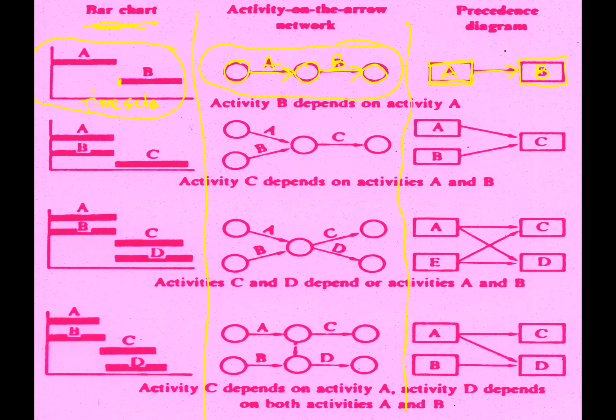Let's say activity A runs for 5 days. Activity B runs for 4 days. You see, from the calculation, first day and then fifth day, and then at the end of the fifth day or the following days, because we only use the working days. We do not include non-working days. 5 + 4 = 9. You see, we completed the project in 9 days. And how to calculate here?